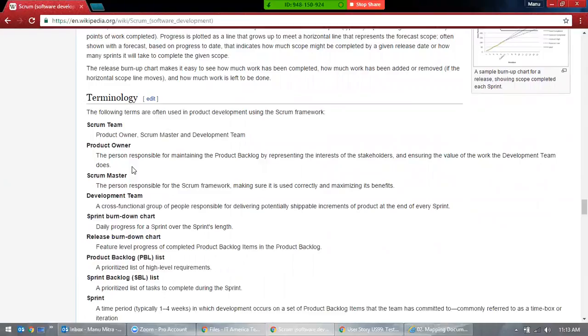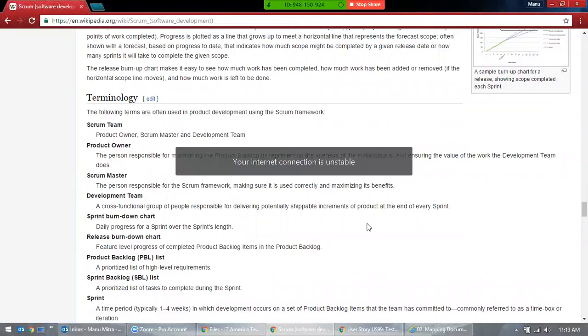That's it. That's a high level requirement, because you don't know how many features are required, how many buttons, how many images. You don't know how many people should test that or how many developers should work on that. All those things are not specified. So that is the product backlog. It can be as short as one line statement.